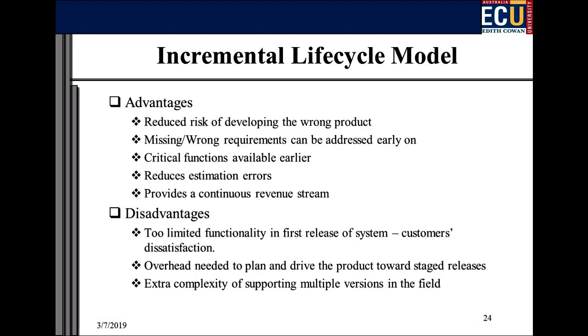I tell them, don't be stupid. I don't quite say that. Your deliverable hinges on this thing working. Why are you putting it at the end? I don't care whether it's got a pretty user interface or that it's doing this and that. I need this, so put this first. Once you get this up and running, if you've got spare time, great, refine it and make it look good and so on. But if you have just this critical thing, you're not going to fail the unit, so put that first.